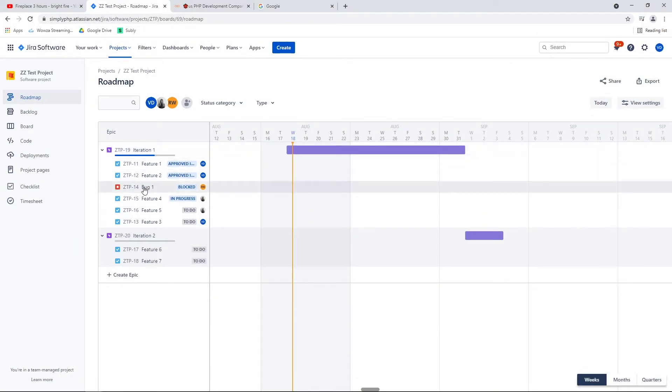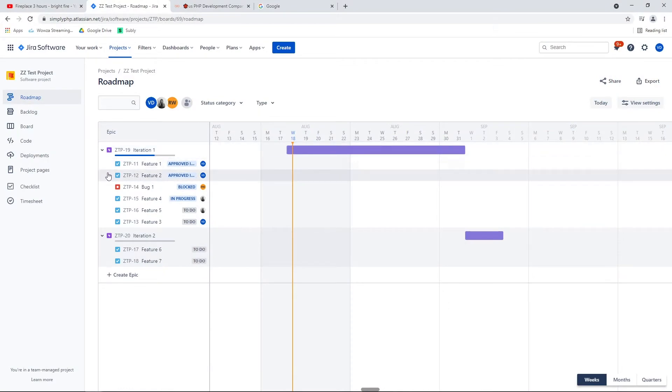A real project would have a lot more going on. And roadmaps do change quite a lot because the majority of our projects don't use rigorous Agile — our clients need flexibility because their business priorities change quite often. So we need to be adaptable. Hence why we use iterations instead of sprints — it allows us to move tasks around quickly and reshuffle priorities pretty simply, without going through a whole sprint process.